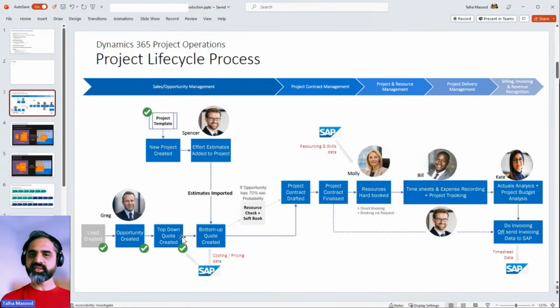People sometimes create a project plan in OneNote, like a notepad, or an Excel file, or a Word document. When we create that project plan, which has 10, 20, 30, 40 lines, every line is given a certain estimate of hours or days, and then how many people will be working on that. And then all of that estimate gets summed up to a total figure.